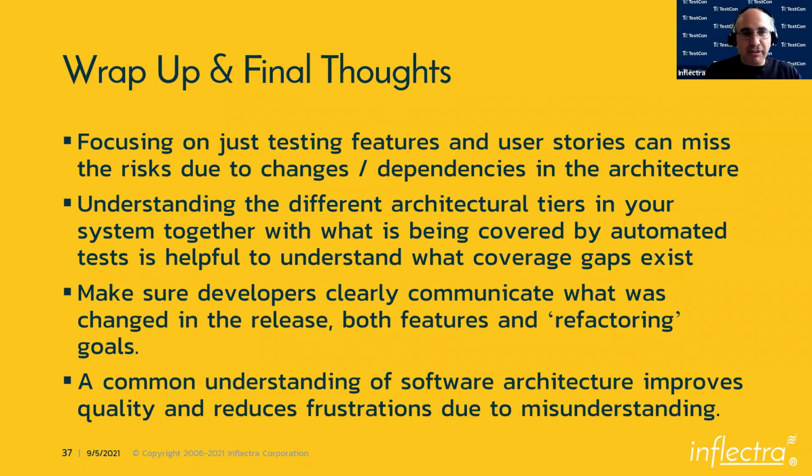And with that, I'm going to wrap up today's talk. I just wanted to give a few takeaways. First of all, when you're focusing on testing, it's very easy to get into what I call a user story driven mindset. We've got these stories, we're going to test them, we're going to do some basic regression testing, and we're going to be done. That's a very simplistic view. Make sure you understand the architecture. Look at what changed outside of user stories. Were there any refactoring goals? Were there any risks that were introduced into the architecture?